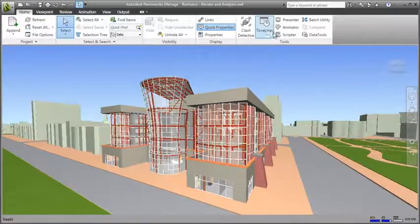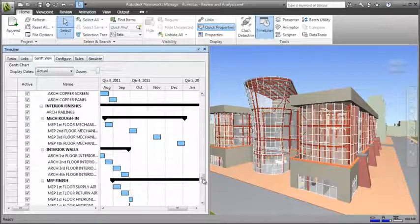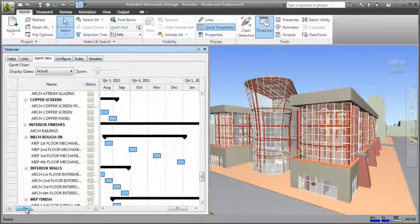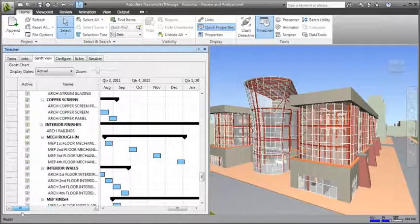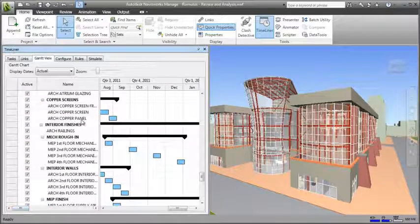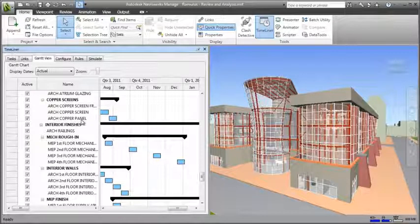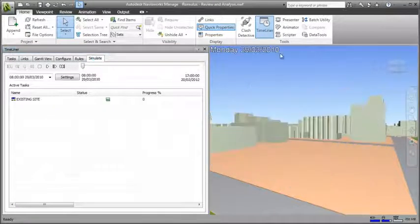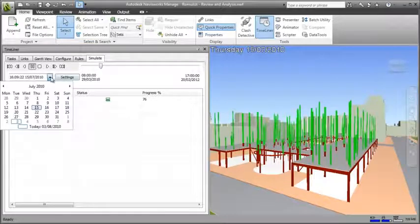Integrating design and construction models with construction schedules from third-party planning applications enables project stakeholders to visualize and validate their plans, and also simulate alternatives to prepare for what-if scenarios and identify optimum schedules. Here you can see the schedule in a Gantt chart within Navisworks, with each task linked to the design elements within the project model. In the simulation you can see the date up in the top left, and you have a project timeline that you can play back, scroll through or jump to specific dates.